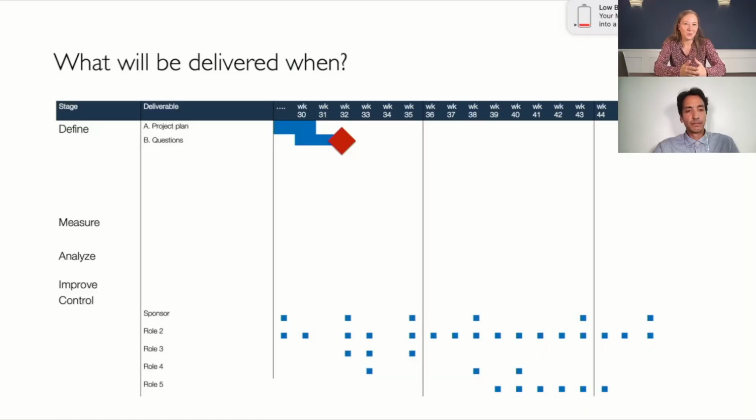So from the beginning, when you're making the plan, you can communicate with the people that you don't know yet whether it will be possible to do the process-mining analysis for this process. So you have built in this breaking point in the beginning where you can then have a go or no-go decision. And if you have communicated this clearly from the beginning, then there's no surprise, and it's not a failure of your project if the data turns out not to be good, right? People are prepared for what they are getting. So it's really about this communication, right?